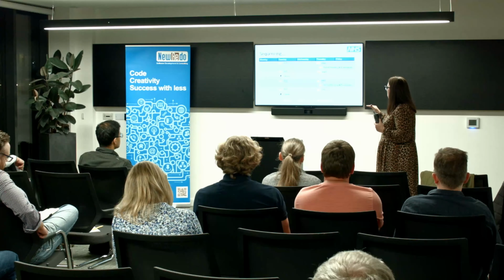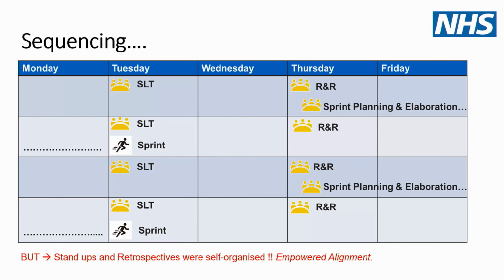So senior leadership team would meet on Tuesday morning, triage new work. The managers of each of the squads would pick that up Tuesday afternoon, review it Wednesday, meet on Thursday to talk about it with their peers. Have you had this before? How did you manage it? What can we learn off each other? And then Thursday afternoon, the teams individually would meet, sprint planning and elaboration, all ready for the sprint to start on the following Tuesday.